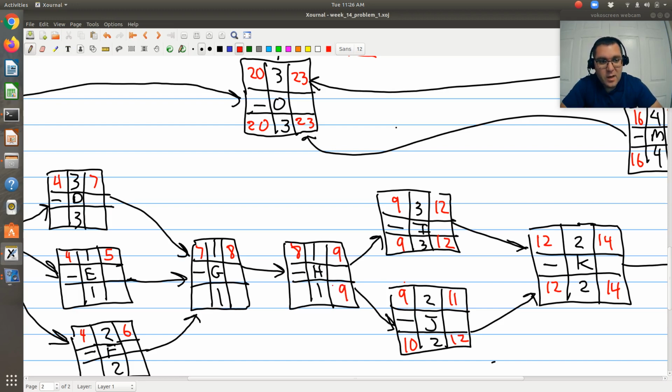Activity H needs to be completed before I and J can begin, so it needs to be done by day 9 so activity I can begin on time. That's a day earlier than needed by J, but that's okay, because J will be able to make that deadline without a problem. H has a duration of 1, so its latest possible starting time is day 8.